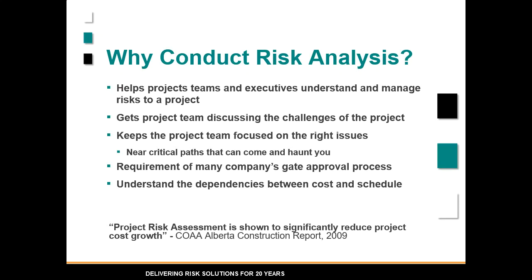I'm in Alberta, Canada. We have a group here called the Construction Owners Association of Alberta. And that group basically is, as the name implies, companies who do a lot of construction projects, typically mega projects in the oil and gas space. And they've done a number of studies on risk analysis. And one of the key things they found out quite early on is that when you do risk analysis on your projects, you significantly reduce the project cost growth on those projects.